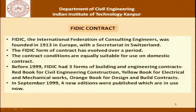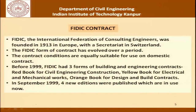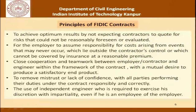Coming to our discussion on FIDIC contracts: FIDIC is the International Federation of Consulting Engineers — this is the English translation of the professional body which was founded in 1913 in Europe with the secretariat in Switzerland. The contract conditions as defined in FIDIC are equally suitable for use in domestic contracts; it is not necessarily focused on international contracts. Before 1999, FIDIC had three forms: the red book for civil engineering construction, the yellow book for electrical and mechanical works, and the orange book for design and build contracts. In 1999, four new editions were published which are in use today. We will go through the principles of FIDIC contracts in this slide.